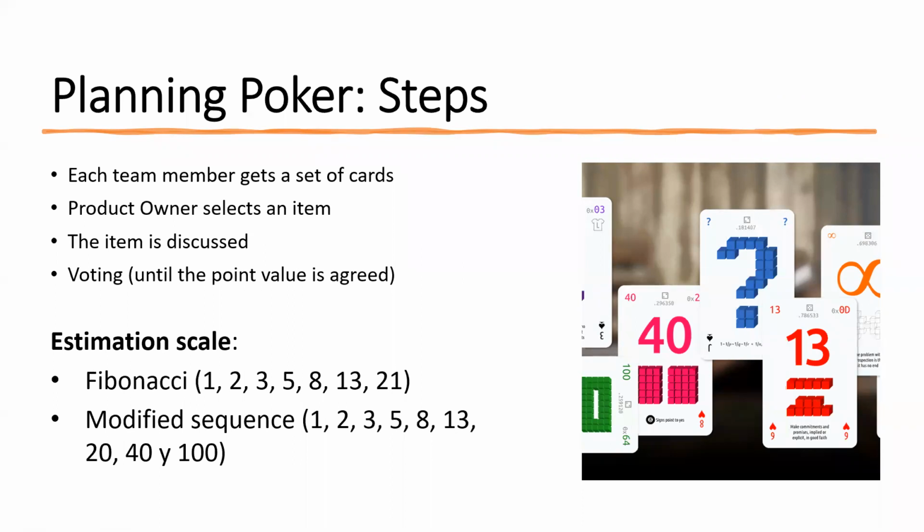Great. So how would you overcome the challenge that you've just mentioned with estimation? You're sitting in an estimation session, one member of the team, very skilled, says it's a 3, another member of the team who's new says it's a 13, but you're not sure who's actually going to do the work during the sprint. That's why the team should discuss this, who's going to take this item to complete. So if our junior colleague would take this item, we would estimate it as 13 and we will help him or her to complete it in time.